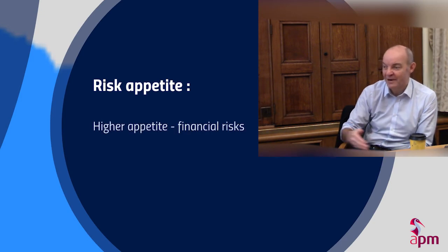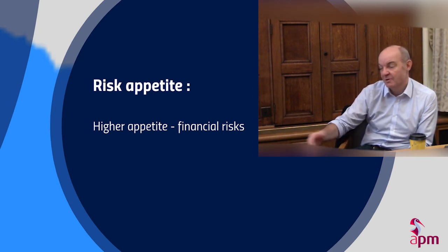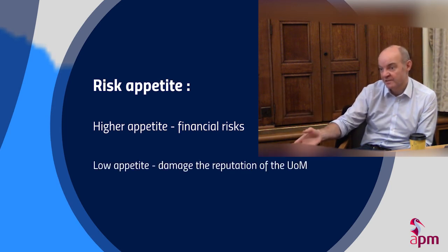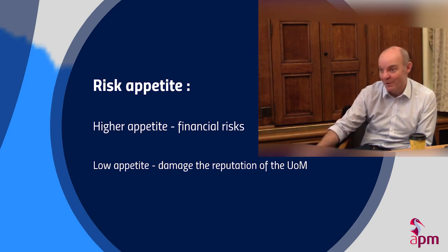Risk appetite varies depending on what you're looking at. So I've already said, in terms of overall financial risk to the organisation, this is pretty low financial risk. If there's a risk that we will damage the reputation at university, people have a very low appetite for that risk.